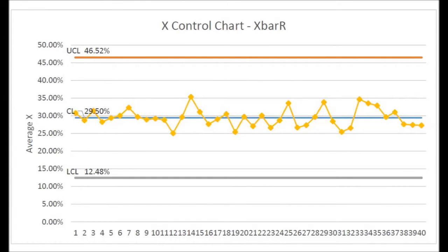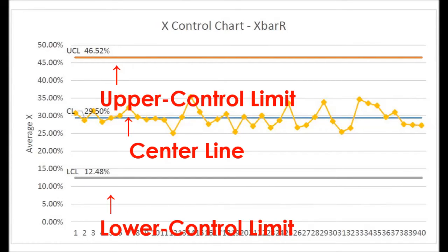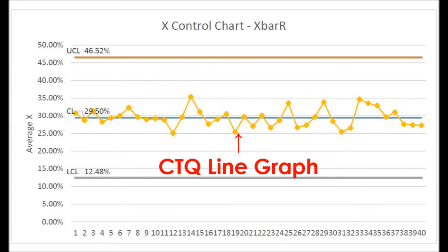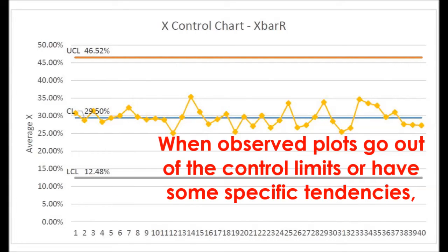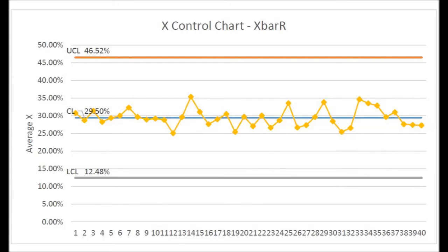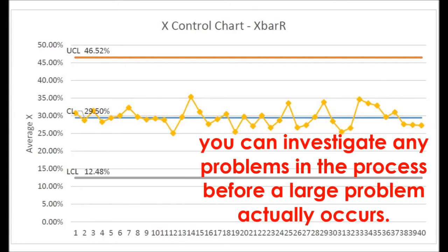This is a control chart. It has three straight lines of center, upper control limit, and lower control limit on a line graph. When observed plots go out of the control limits or have some specific tendencies, you can see that there were special cause variation and investigate any problems in the process before a large problem actually occurs.